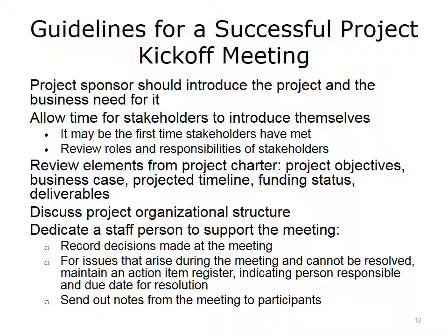Discuss the organizational structure of your team. Draw upon those elements on the project charter as a reference. Dedicate a staff person to support the meeting by recording decisions made. There will be issues that arise during a project kickoff meeting that are simply not practical to resolve during the meeting itself. They need to be tabled for future discussion.